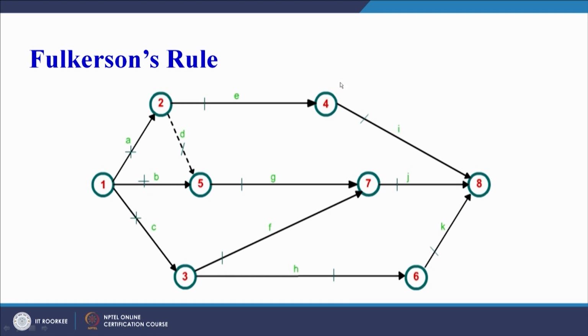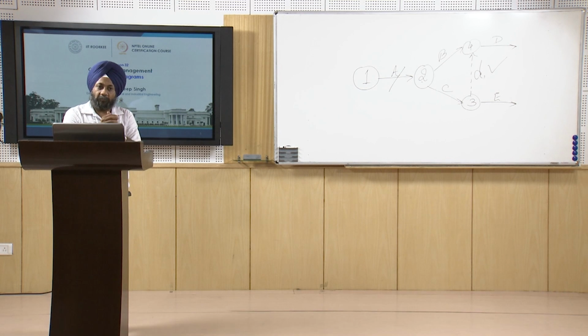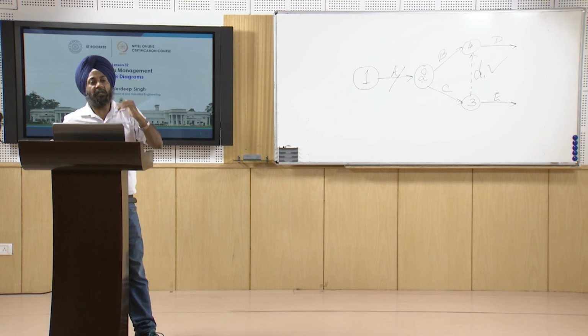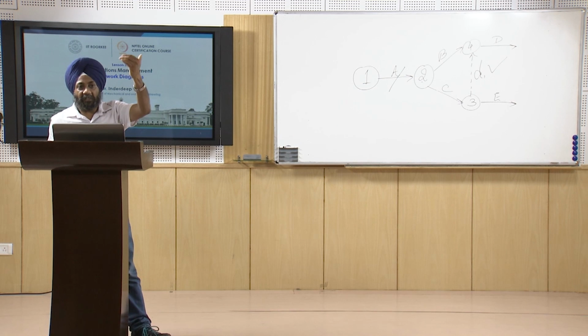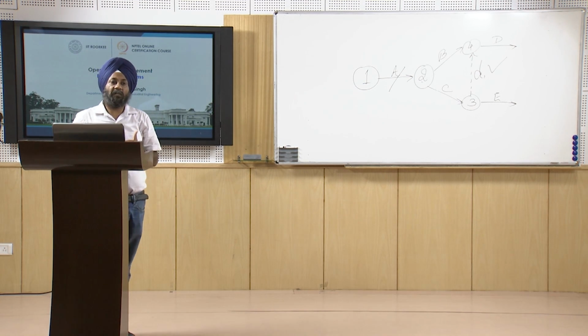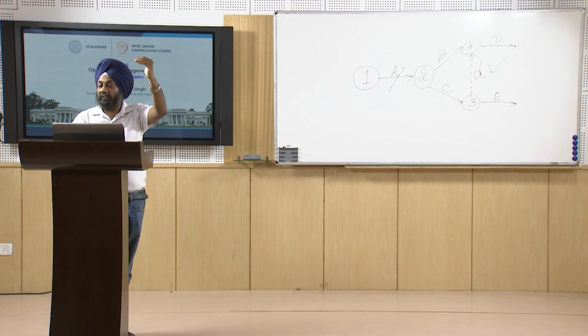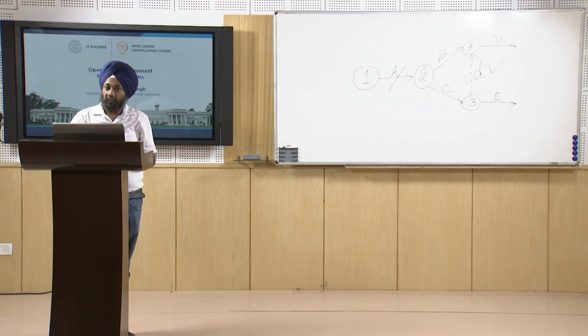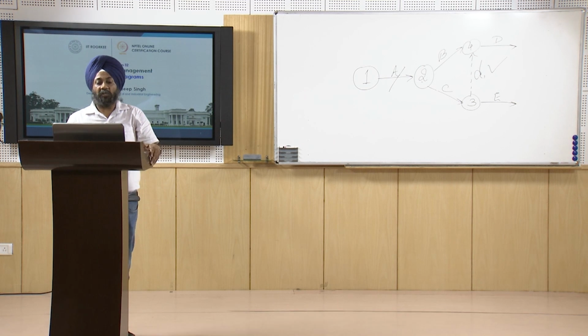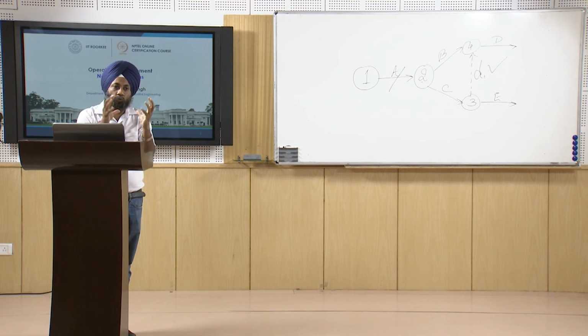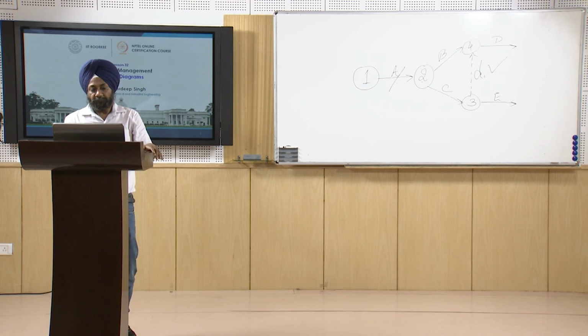So because 4 is on top, we will represent it as 4, and then the 5 activity. Similarly, we will keep on striking off the activities that are coming out from a particular event, and keep on numbering. You can practice this. In case of any conflict, the top representing event is given the lower number and the bottom is given the higher number, as in case of 2 and 3, similarly 4 and 5. So this is a rule for numbering of the nodes.